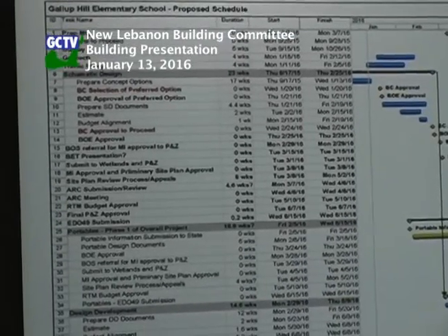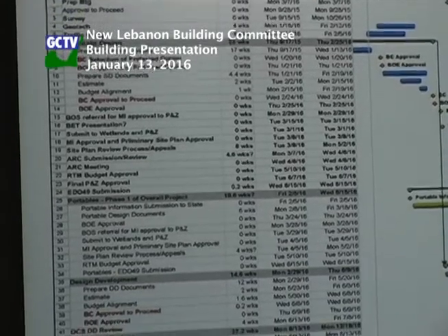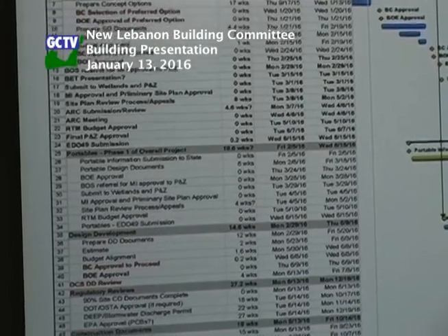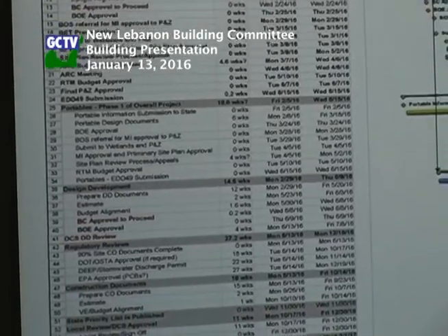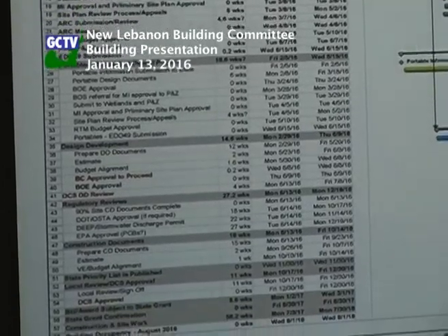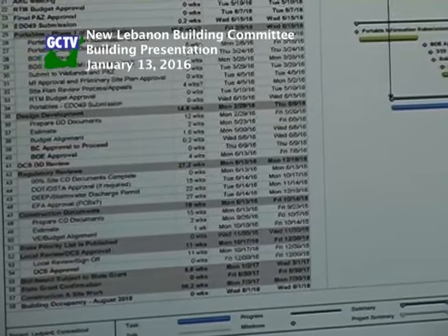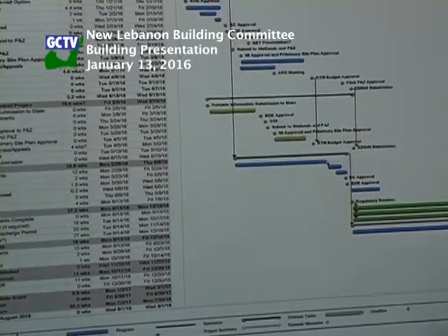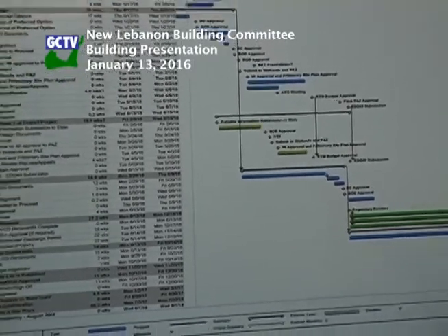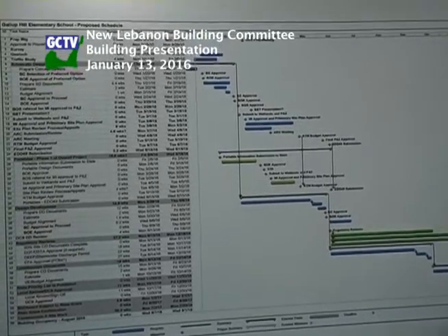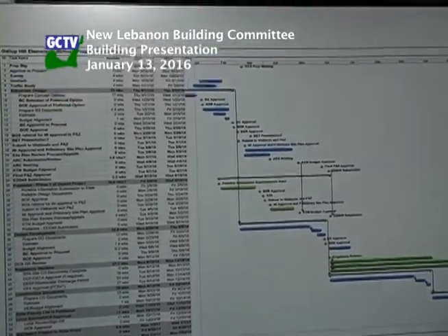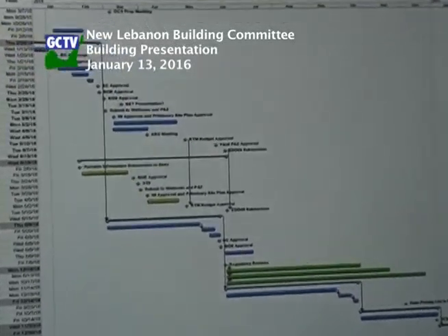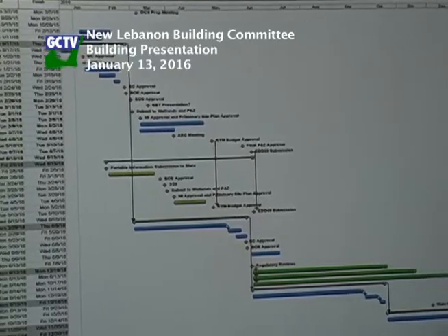Last time we were about halfway through. We're still not halfway through. So we still have to go through quite a bit more plan development, building elevation. The sketches that Taishi showed you are not final. We have to do a little bit more work with them. We would like to work with the construction manager that you've selected, have them involved in the budgeting and scheduling tasks, have them start doing their constructability reviews, helping us determine whether the lowest level should be built on an elevated structure with columns, or whether it should be built on fill. We're still not certain which is the most cost-effective way to go.